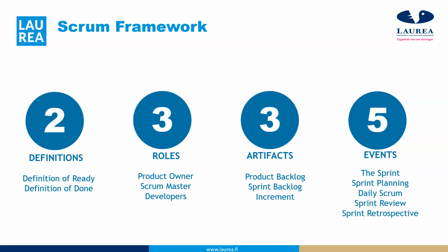So here, with this story, what do we need to say that it is ready for you to start designing the page for that? And then we have the definition of done, that is, what needs to be done to say that this is done. Like you have acceptance criteria: okay, I'm able to see that I can browse through degrees, bachelor's degrees, master's degrees, and others. Based on these we can say that, okay, the story is done.